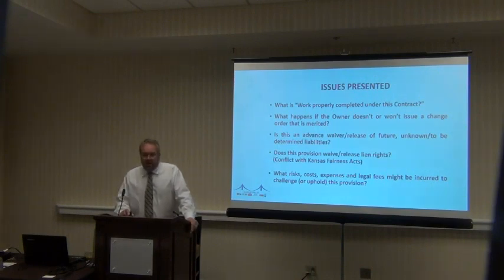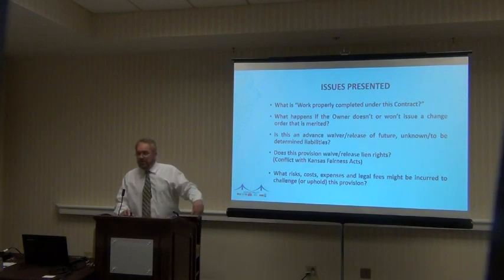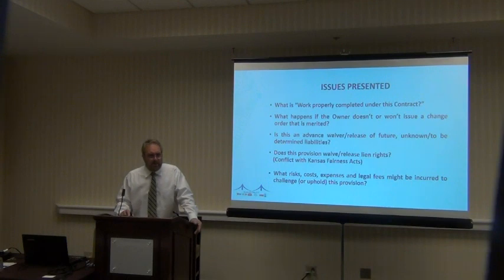Another very interesting question to me is, does all that laundry list of stuff that's gone, that you can't do, even though you didn't know about it, does it release your right to file a mechanics lien? Because the Kansas Fairness in Private Construction Contract Act clearly says a provision in a contract which purports to release the right to file or waive the right to file a mechanics lien is void and unenforceable and cannot be waived by the parties to a private contract. So if I was in a position where I was needing to attack this clause, I would probably go there because I think that's a direct statutory reference that I could probably set a hook in the fish, hopefully. How I would defend against that, I'm not sure.